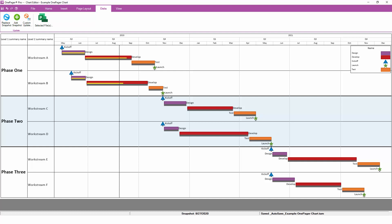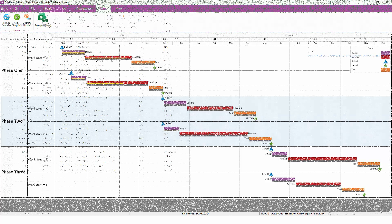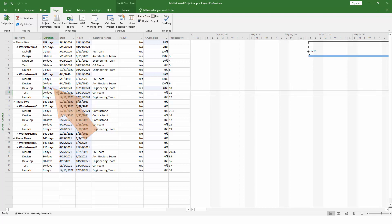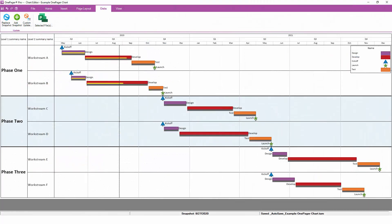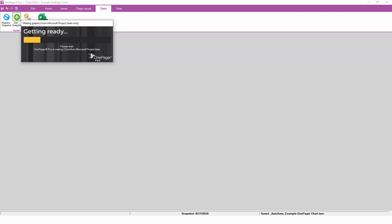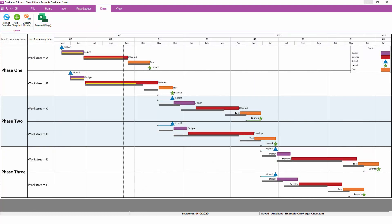OnePager also lets you refresh your chart over time and track your incremental updates on a weekly or monthly basis. This is because OnePager supports multiple snapshots at different dates, all within the same chart. Remember that when we first created the example chart, we did so as of today's date. Let's go back into Microsoft Project now and adjust a few tasks. Now in OnePager, we can click the Add Snapshot button and specify a second snapshot date two weeks from today. OnePager will go back to Microsoft Project and will re-import the newer version of the schedule, but instead of simply updating the chart as we did before, it will create a second snapshot in the same report.